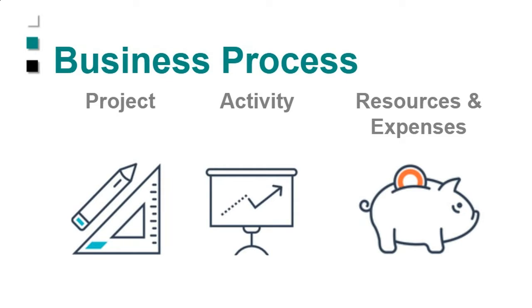Now, in terms of business processes, we kind of categorize things into schedule quality checks and then business process quality checks. So things like checking whether you've got activity names that are duplicated or activity IDs that don't have a certain pattern to the format, if you've got a standard you're asking the team to follow.